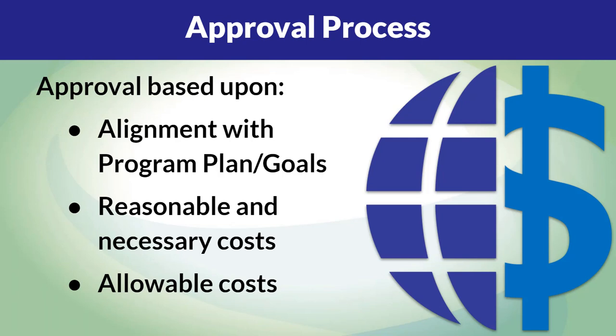The last point of consideration for your CLC consultant is whether the proposed changes are allowable per federal and state guidelines. A few common areas of review include the purchase of food, which is generally not allowed, capital objects, which are generally not allowed, with the exception of a vehicle lease, and the rule that CLC monies may only be used to supplement, not supplant, existing services.